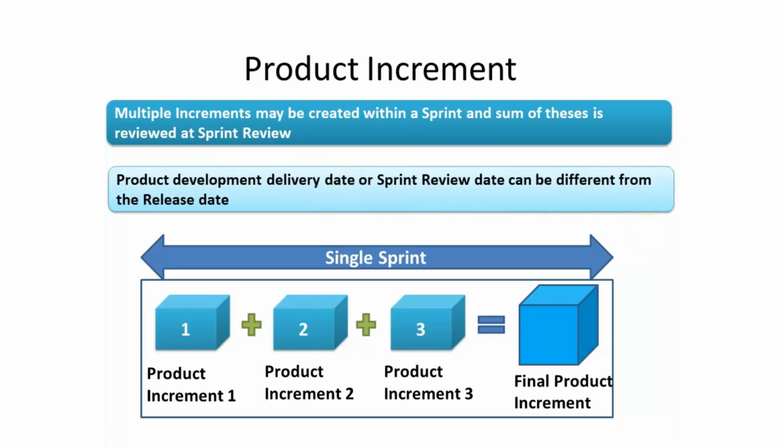The product development delivery date or the sprint review date can be different from the release date. When a product increment should be released is at the discretion of the product owner. Now let us understand the definition of done.